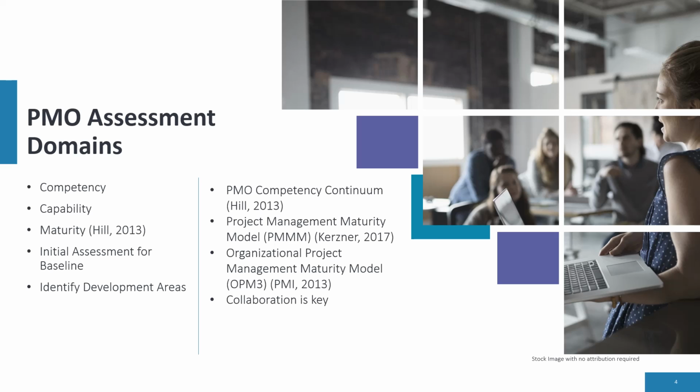As part of the PMO's role in helping increase the contribution to business results, the PMO can help develop a framework to track continuous improvement of project-related skills, competencies, and practices throughout the enterprise. Some of the common frameworks used by PMOs are the PMO Competency Continuum, the Project Management Maturity Model, PMMM, and the Organizational Project Management Maturity Model, or the OPM3.